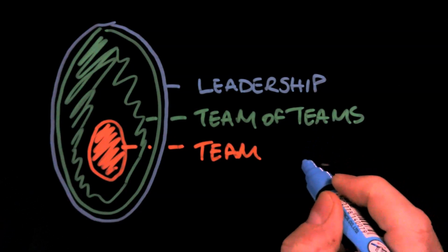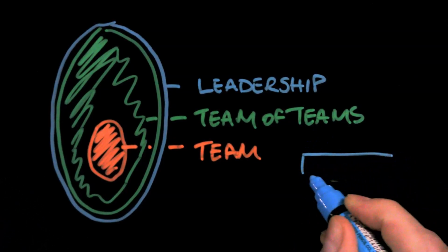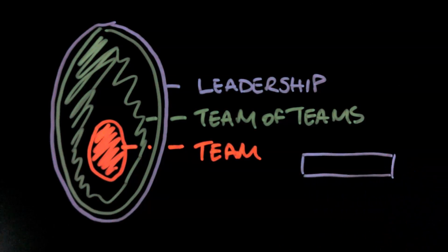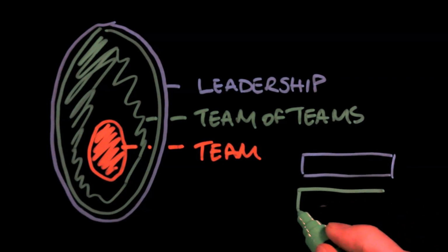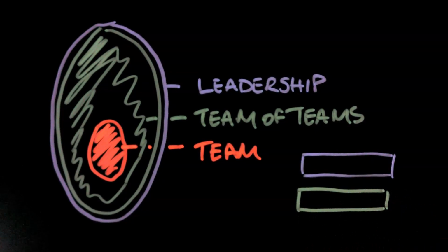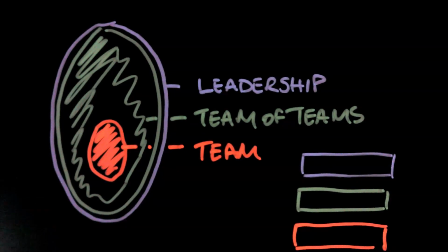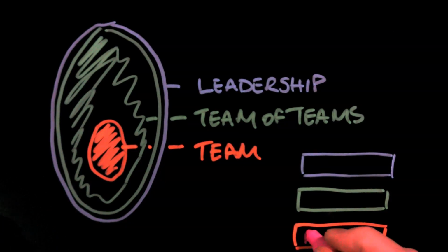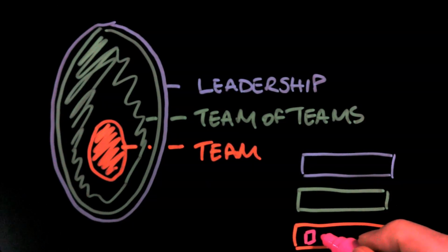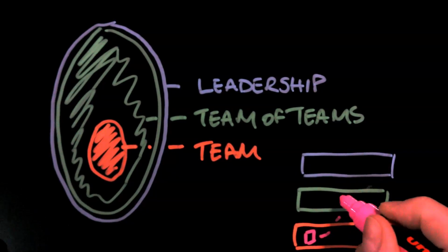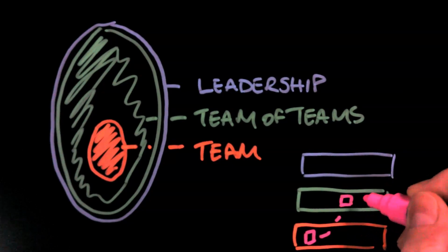What I like to do is set up a kanban board of three different layers, the three layers that you've got in this impediment avocado structure, if you will. You may originate an impediment in one layer, but as you identify what you've got within your empowerment to resolve, you may need to escalate that up the chain.